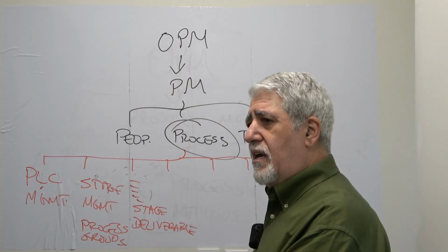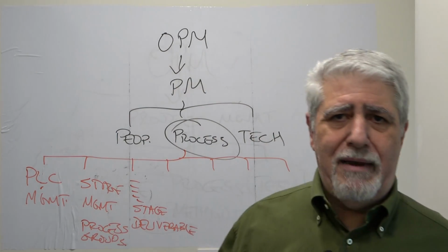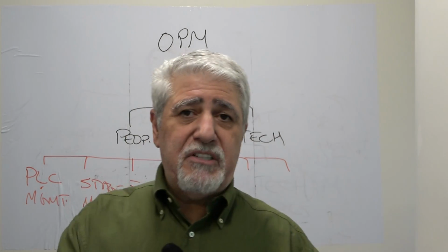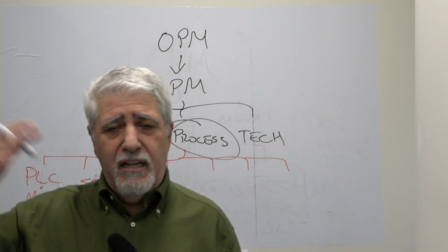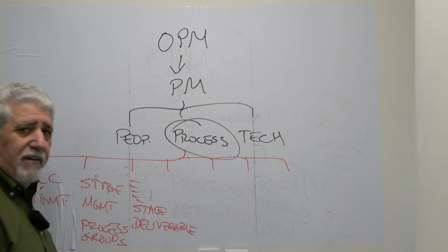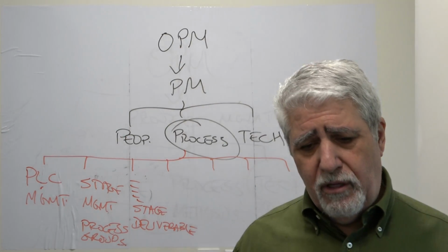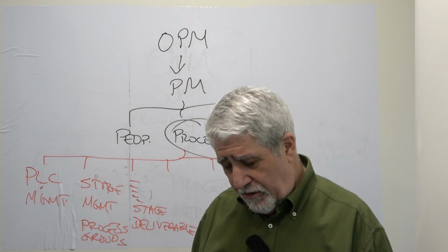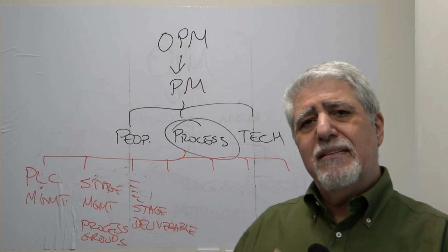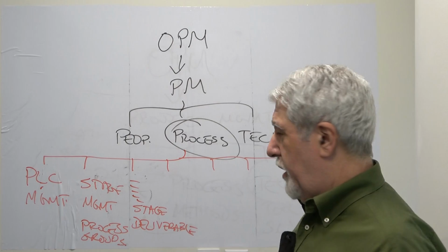If we are in the definition stage in Uruk, usually we produce a detailed plan, right? If we are in the construction phase of a project that has construction of a facility, the output will be the constructed facility. So basically, the stage deliverable is a document or a set of deliverables, might be combined under one document, and that typically will be the result or documentation of the stage work.